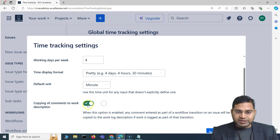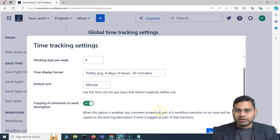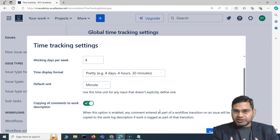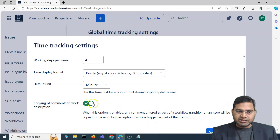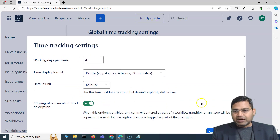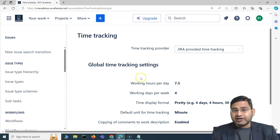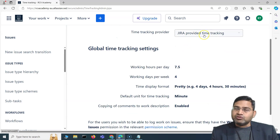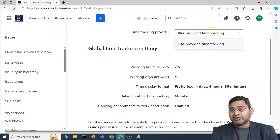That's what this setting means — it's a topic for a more complete separate video, but at a high level: during a workflow transition, if you log work and enter a comment, and this option is enabled, the comment is copied to the work log. This can be enabled or disabled, but it is enabled by default. There are also external plugins available for time tracking from the Jira Atlassian Marketplace.